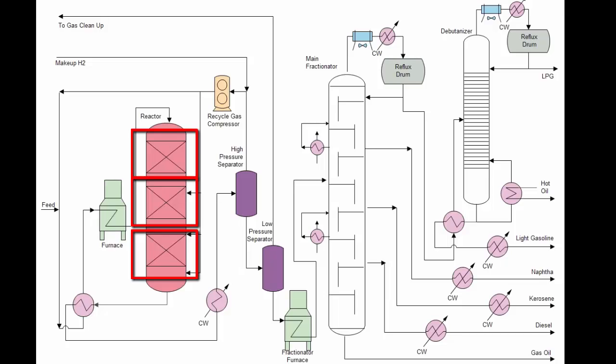Once a plant begins a maintenance shutdown, all the catalyst must be cooled from these high operating temperatures down to ambient temperatures. Given the amount of catalyst mass, this takes time and is very often the bottleneck or is on the critical path for the entire turnaround.